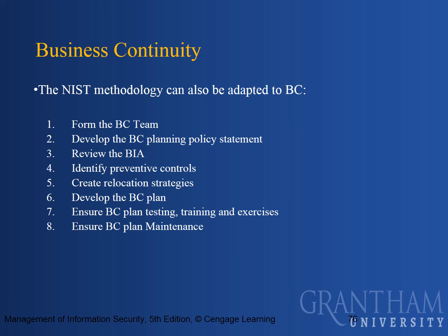The NIST methodology can be adapted to business continuity as well. Form the team, develop the policy statement, review the BIA, identify preventative controls, create strategies, develop the plan, test it, train, exercise, and maintenance of the BC plan, because it also is a living document.